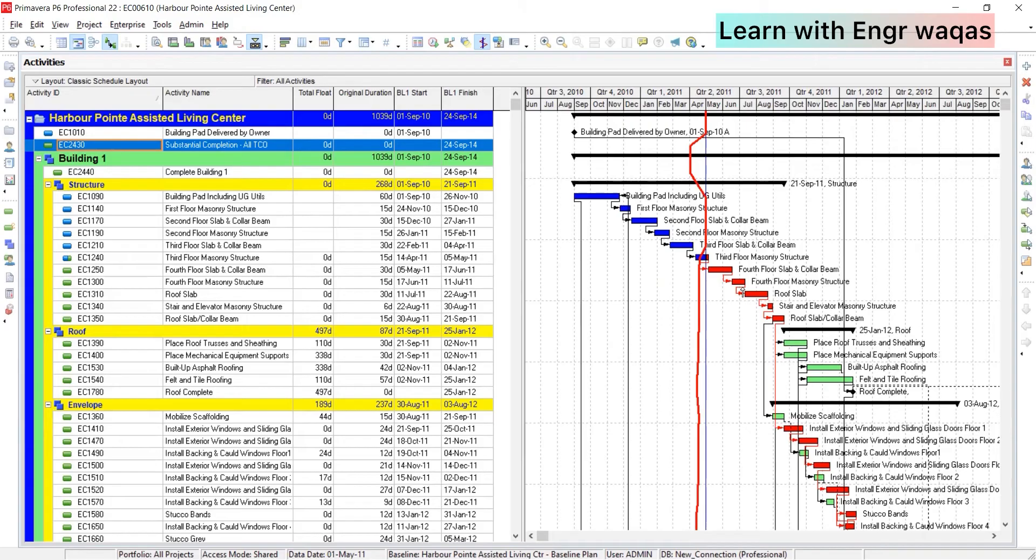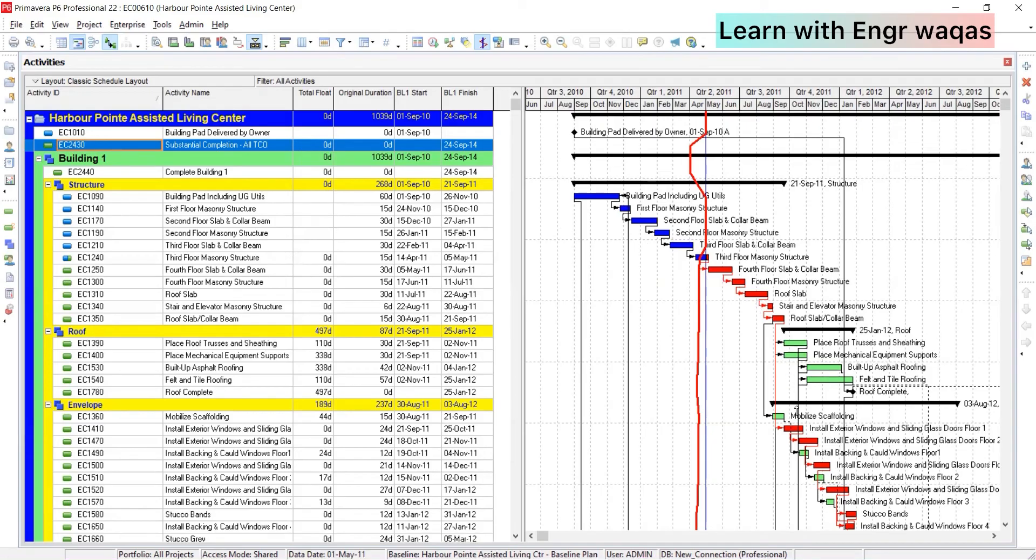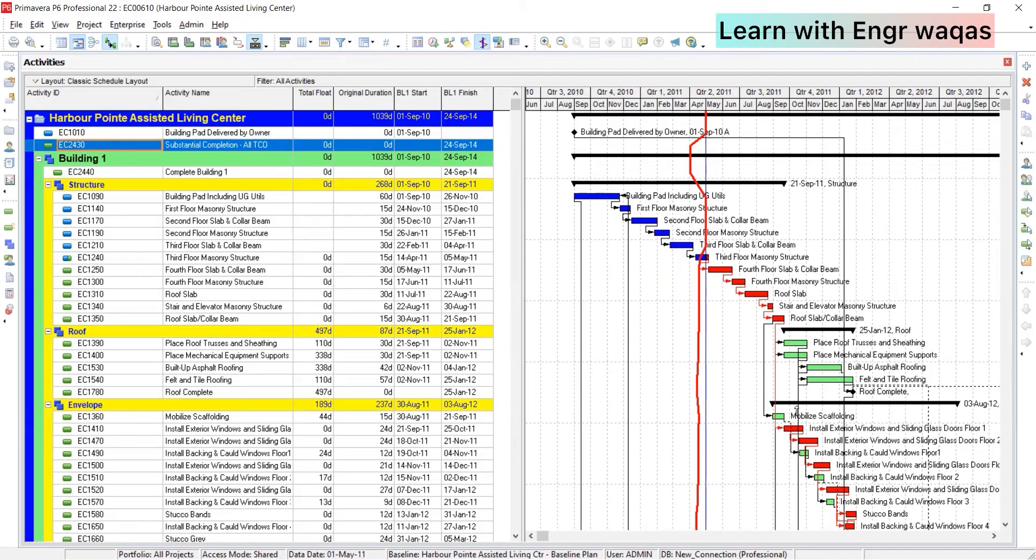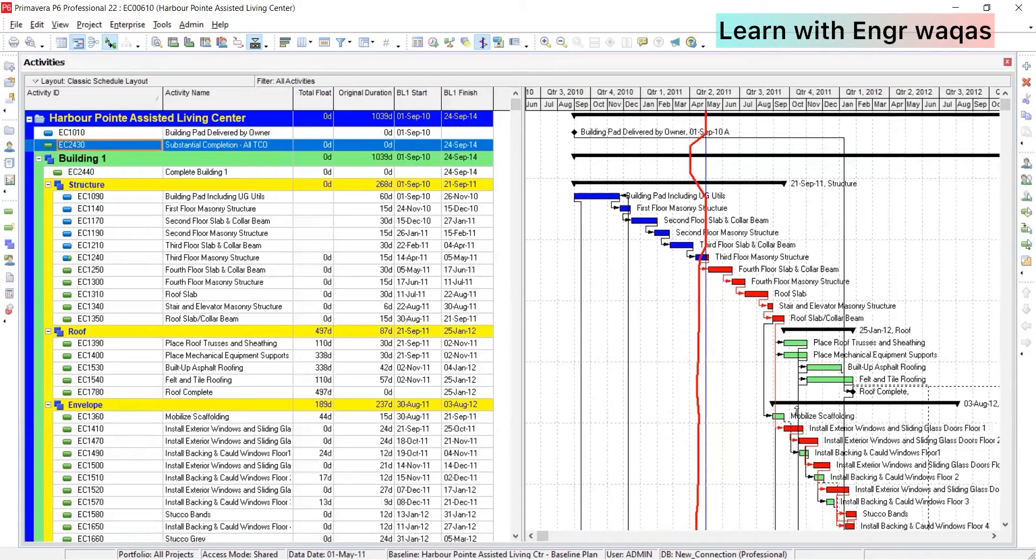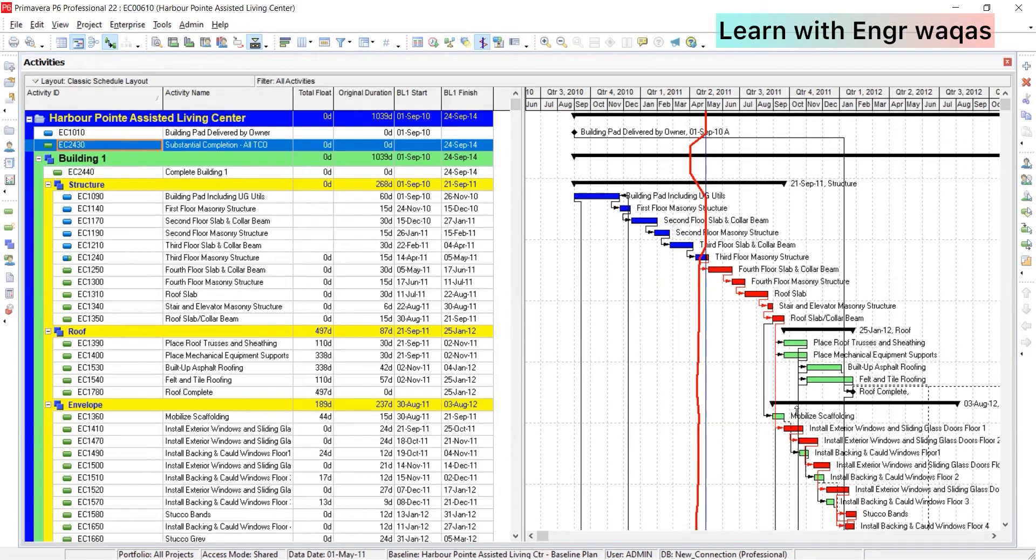So total float is here and I can see there are red color activities. The most important thing which I am going to address - that in progress project, because these are the actual activities which are actually progressed, and these are not yet started non-critical activity, critical activity but not yet started. So the most important thing which will be asked in job interviews: is your float, is your CPM a dynamic property of your project or is it static? So as long as it concerns with your planning phase, it is a static property. CPM is locked, it's not going to change. After planning, when you are going to progress on site, your works proceed towards execution, changes are being happened there. So then CPM also get changed along with your project execution and all that. So that would call it dynamic during your execution, CPM would be dynamic.